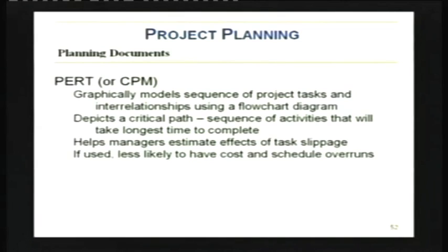So that is there. Once that is given to you, you go and walk up to the domain expert and ask them what details are involved in carrying out this project. They start giving you details, the timings, the cost, and they also tell you what kind of expertise would be required, so you can identify the resources required for carrying out certain tasks. The same people can't do everything, so you've got to make sure you match the requirements with people who are available.